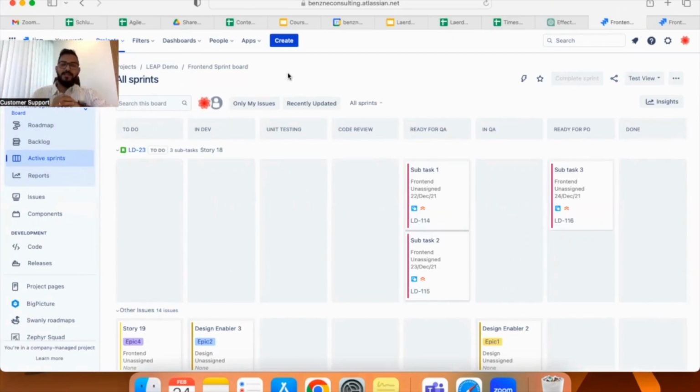Another way to do a daily stand-up meeting or a scrum meeting is to go story by story. How many stories we had planned with respect to sprint planning meeting? And we can talk about the first story, talk about what is happening, what are the tasks in the story, and we can also visualize the task status on your Jira board with active sprints tab. You can talk about where we are with respect to the task and what is the status of the story. Once one story is discussed in detail, we understand the progress we made. You can go to the next story and understand the progress we have made there.